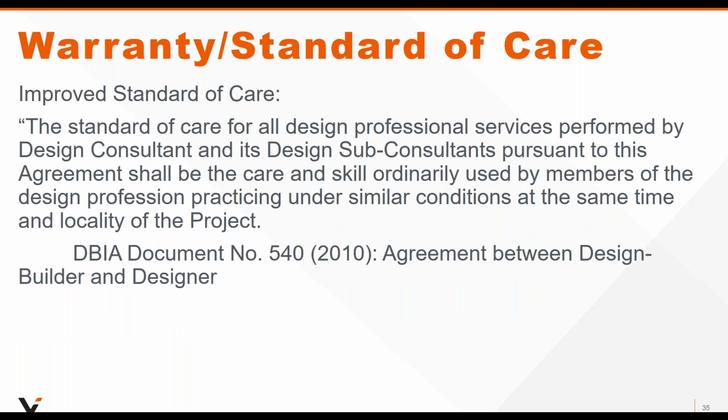So you should insist that you use a version that's from 2010, right? A typical standard of care. That's the type of exposure that is more reasonable that you should insist on.